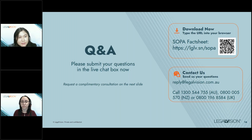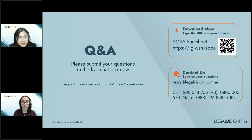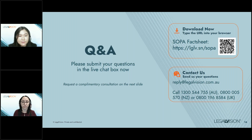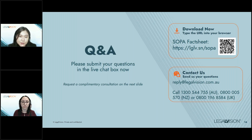Question: How do you deal with defect claims? If you're the respondent providing a payment schedule, there may be a basis to reduce the amount owing to the contractor. When a contractor submits a payment claim, you need to respond stating you only agree to a reduced amount, set out the nature of the defects, and include any evidence to support those defect claims — for example, photographs. Best practice is to get an expert like an engineer to assess the defects and identify rectification works, then engage a quantity surveyor to quantify the cost to rectify the defects. Remember, this all needs to be done within a very strict timeframe, so once you notice defects it's important to get a head start on lining up reports.